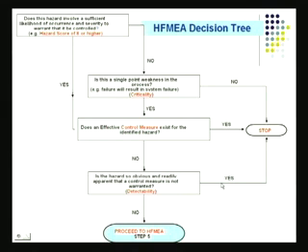If you have good detection capability, just go ahead and act. There is no real issue there. Suppose it is not a high rating, let's say a rating like 3, 4, 5, 6 and so forth, then you come down this branch and ask yourself the question, is this a single point of weakness? If yes, then you probably go through the other boxes. If it is not a single point of weakness, you stop right there. Stop basically means you move on now to other actions that are possible.